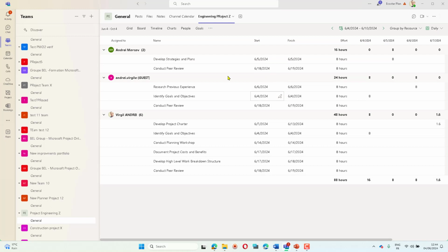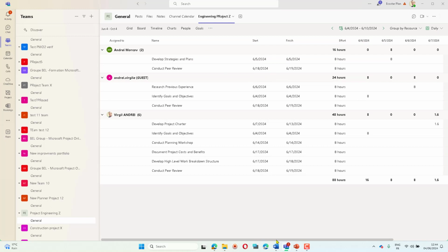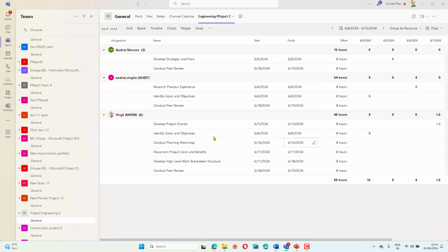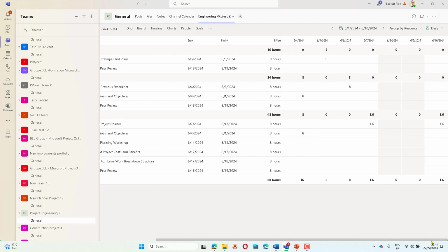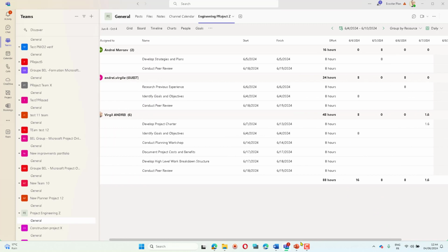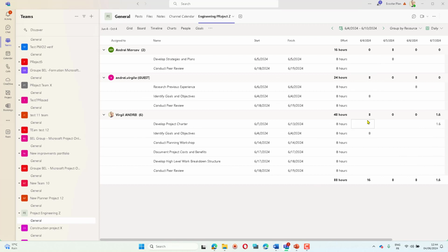Okay, further on the assignment tab, and this is very important, it's the number of hours that are assigned to each resource. So I can see at this moment if it's really possible to work with these people, or if I will have some over-allocations, for example. So currently, apparently it's okay. And of course you can do all this analysis. Okay, so we have analyzed all that.